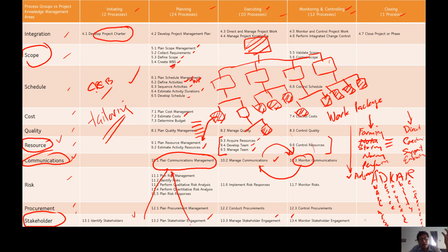So if the WBS is not done in an elaborate way or not complete, there'll be a lot of change requests at the end of the day to identify work that we have missed out, a lot of hassle, a lot of wasted time. So try to do things right the first time as much as you can. Of course, there will be some flaws here and there, that's fine, but just keep it to the minimum. Do it right the first time, should be our approach, our ideology, shall we call it.